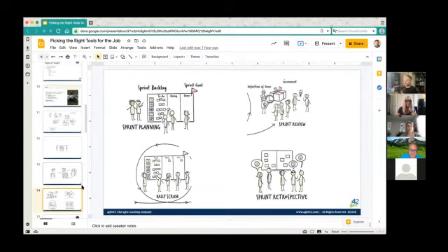At the end of it, we're going to do a review. We're going to get the team together with stakeholders. We're going to show them the product as it is now, and we're going to get feedback on that product. And that feedback may change our plan for that next cycle or sprint. And then finally, we're going to have a retrospective. Just like it's important to review and reflect on the product itself, it's important to review and reflect on our process and how our team works together, right? And so team improvement can happen, right?